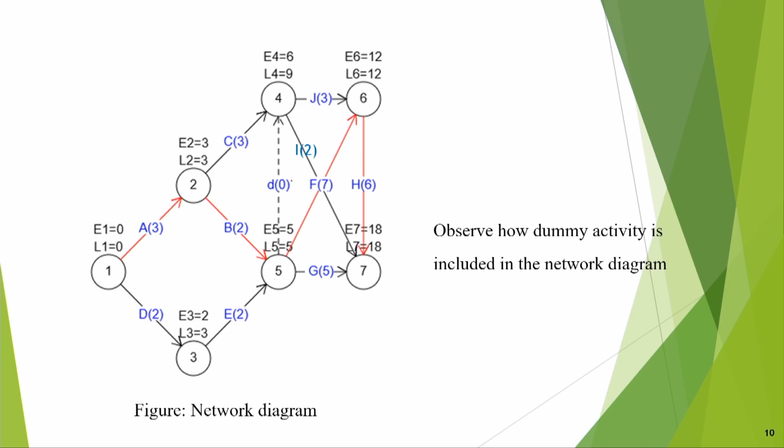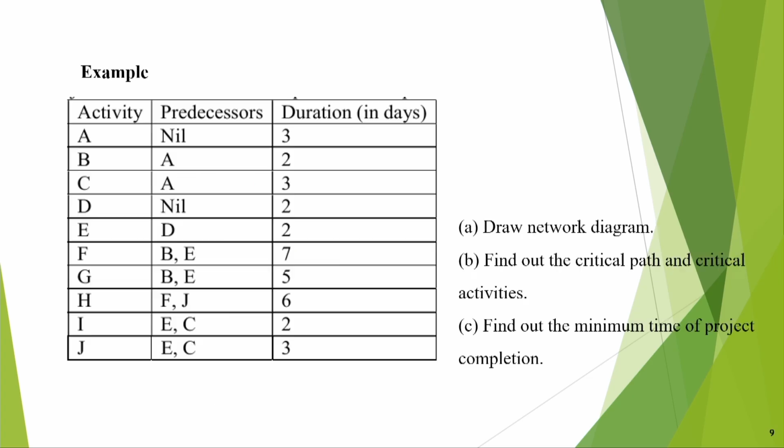I ensured that this dummy activity should also be finished, but the dummy activity itself has a constraint that E should be complete. So, we may have to make dummy activities with 0 time and dotted lines. Then only can I make J.